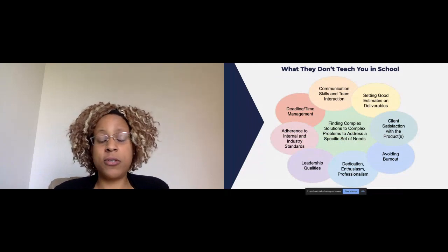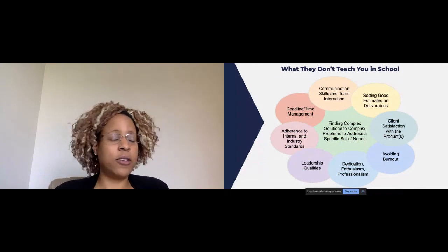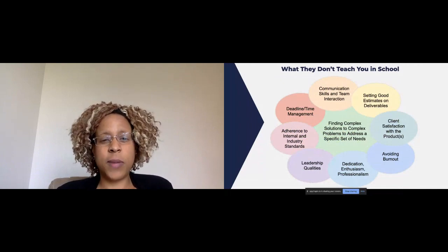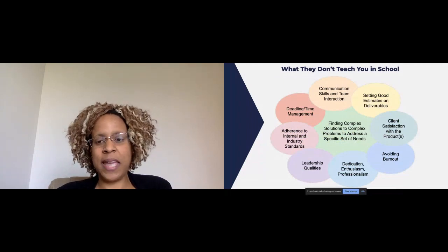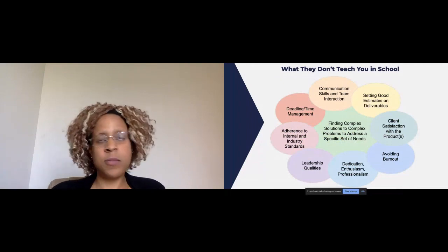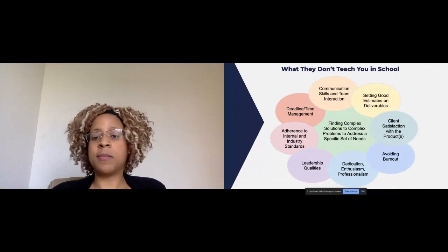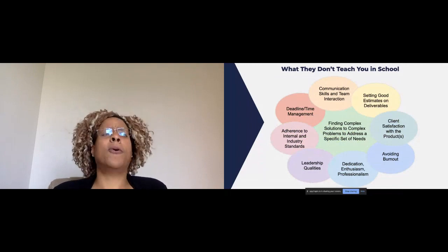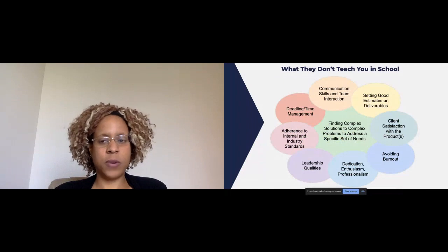Setting good estimates on your deliverables, learning how to do that for whatever your craft is going to take time. And it's a skill to be learned as well, and it's something that you definitely can get caught up in or trip yourself up in, and it's good to learn how to pad to the point where it's comfortable for you to expect some small overage, but not pad to the point that your clients are going to be like, whoa, that is a lot of time, it seems like, for whatever you're asking for, right?